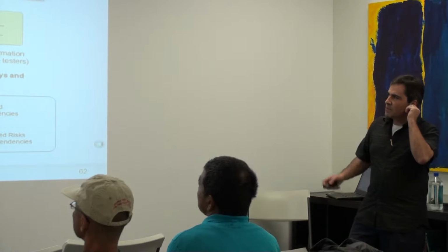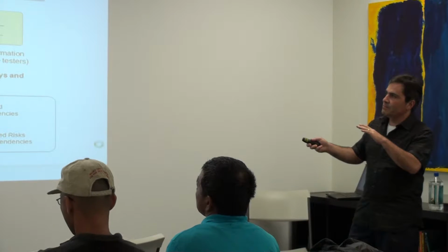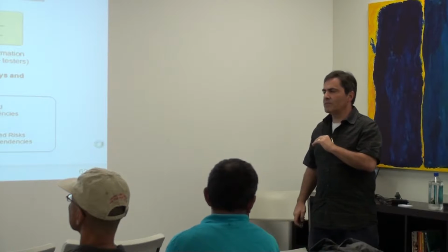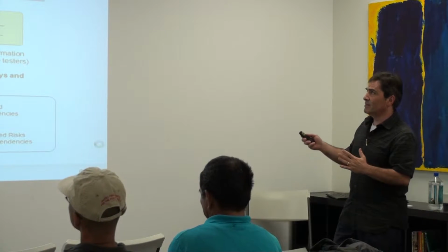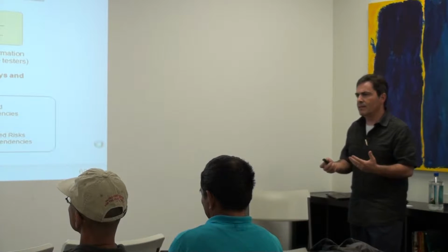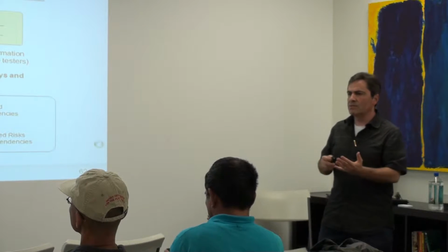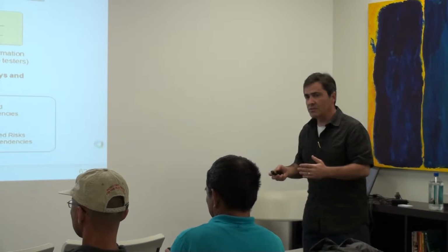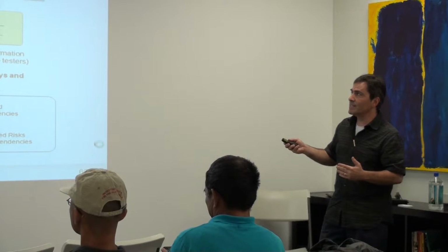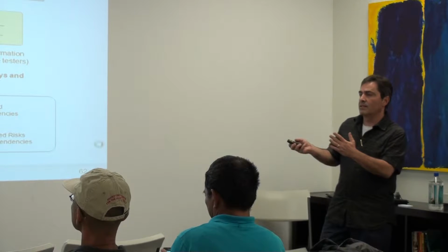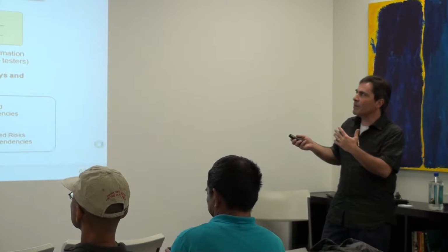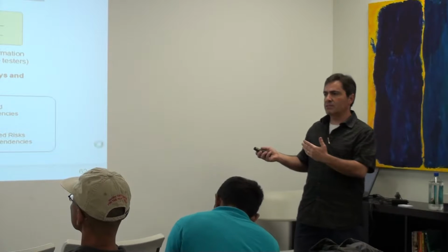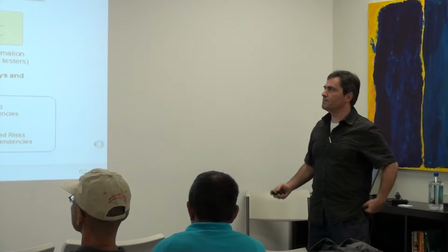So here's how each sprint actually gets planned out, and we reserve the last sprint, we call it a hardening sprint. And the reason for that is, in real life, if you're actually gonna ship something or even internally release anything, you need some time to tidy things up, to get your documentation together, to put together any kind of release notes, to do testing on defects that were caught later during the PSI. So what's seen is that if you don't have that hardening sprint, teams are not able to finish all their work. Now, as teams get better, you may not need that hardening sprint, but initially it's a good idea to keep it.